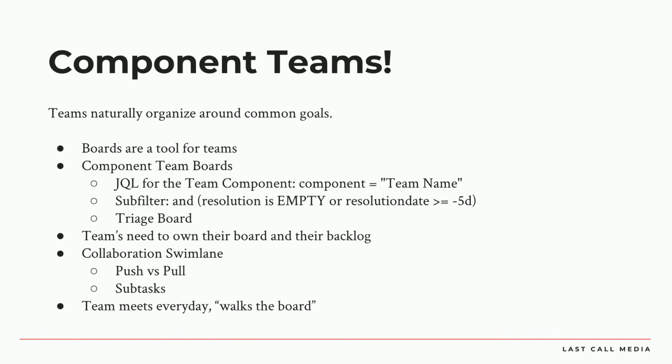I guess just a little tip about that is I like to start at the far right column, so stuff that's in review, and make sure that we either get it back in progress or get it pushed out of the way, and then move to the in progress column and see what's stuck there and try to get it to review or try to get it done, and then look at the to do column to see what's next. Let's start from the right to the left.